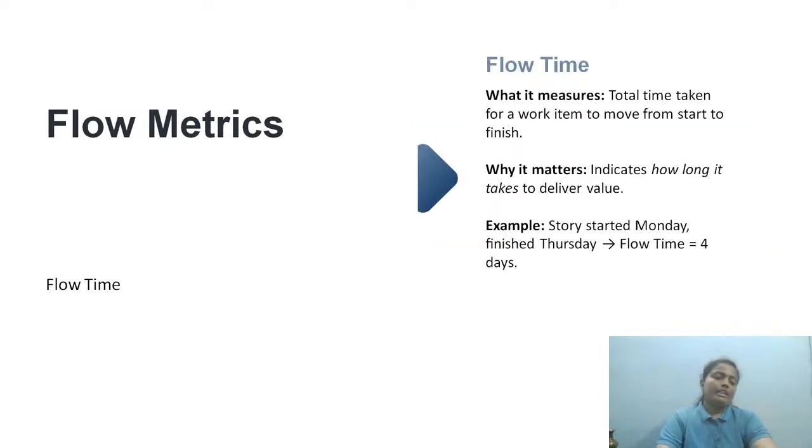Let's get into the next interesting metric, which is flow time. This is a very interesting metric according to me. Why? This metric is also called cycle time. This is something many people are aware of, this terminology called cycle time. Total time that you are investing to start the work and complete the work. Development starts and development is deployed to production.